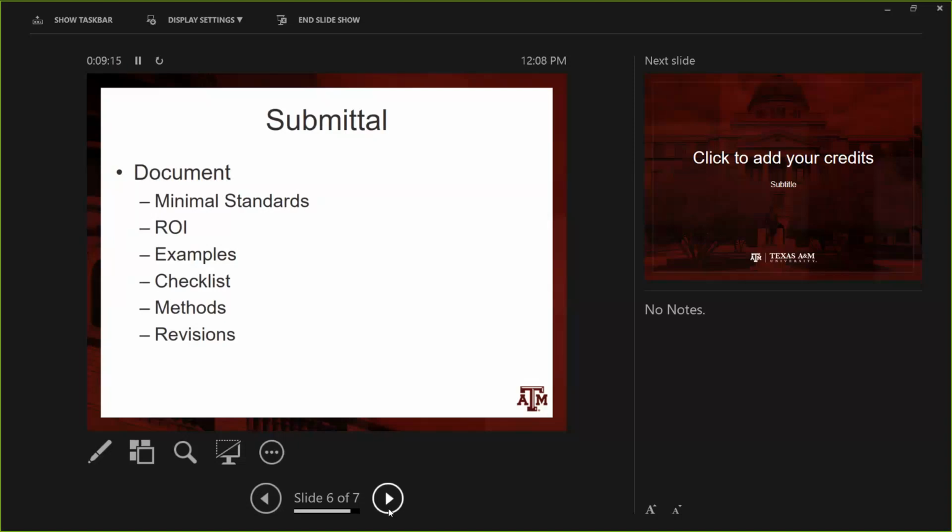He said that the system we set up improved spud to spud times at a 20 to 40% rate because of the way we were using this method of sharing data across the whole board. People were involved in the beginning and the end so that they knew what they could do, instead of it getting handed to them and having to deal with it. They were part of the solution at the beginning, and the people at the beginning were part of the decision at the end.